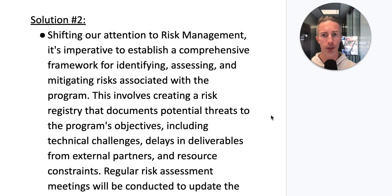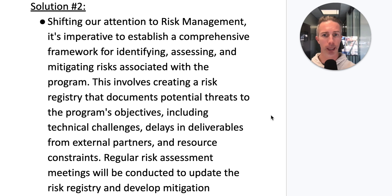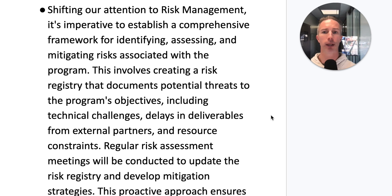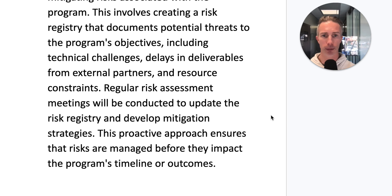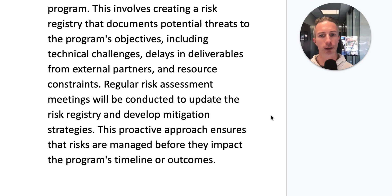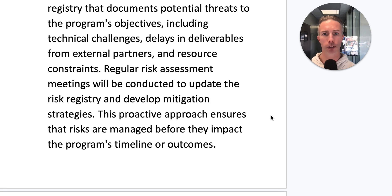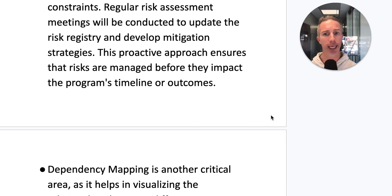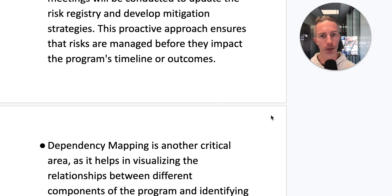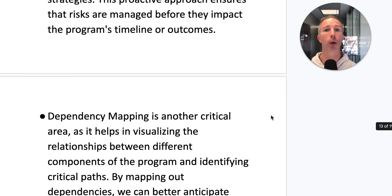Shifting to risk management, it's imperative to establish a comprehensive framework for identifying, assessing, and mitigating risks. This involves creating a risk registry that documents potential threats to the program's objectives, including technical challenges, delays from external partners, and resource constraints. Regular risk assessments will be conducted to update the registry and develop mitigation strategies, ensuring risks are managed before they impact the program's timeline or outcomes.